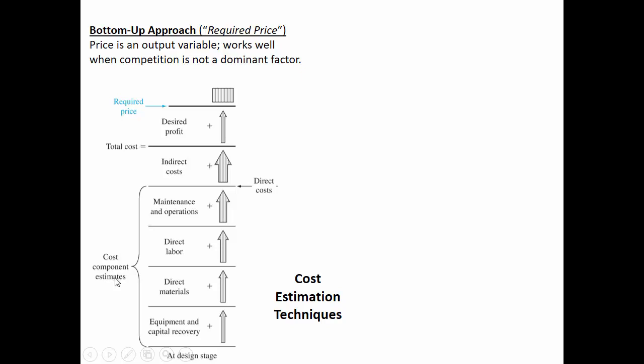So you know the cost per gallon and the number of gallons required. You look at the cost per hour for labor, and then you'd multiply that by the number of hours required. And so those are all the direct costs. Now the indirect costs, my painter has a cell phone that he uses for business purposes, and so that's an expense where it's not directly related to the cost of painting my house, but he has to add some extra costs on top of all of these direct costs to recover the expenses that aren't directly related to a certain job.